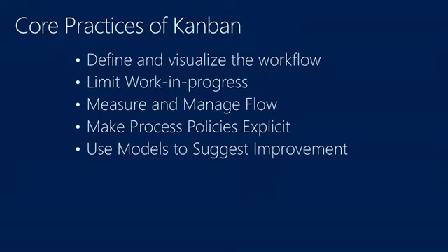I respect that. You don't want to dilute the brand. But Kanban has these principles, and changing Kanban is built into Kanban, right? Changing Scrum is not built into Scrum. You change Scrum, you have people like Ken Schwaber calling you a Scrum butter, right? So with Kanban, the first rule is define a process, and then have things to measure that process, and then change the process on a regular basis, like a Kaizen event.